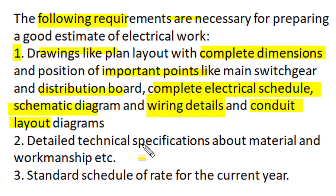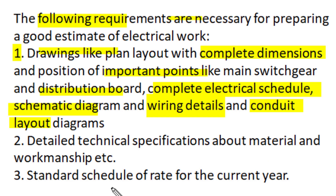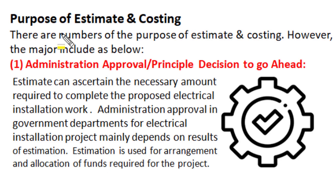We also need detailed technical specifications about all material involved in electrical installation and the workmanship required for installation and execution. Lastly, we need a schedule of rates for material and workmanship under existing conditions, so that standard schedule of rates are referred to and proper adjustments are made as per local conditions and time positions.